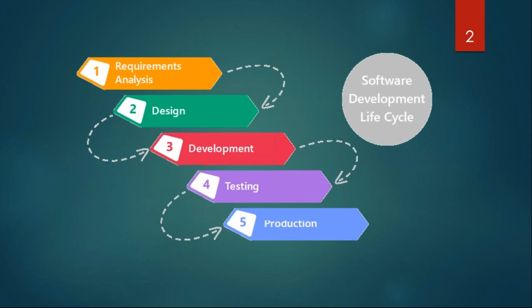If I automate a single process, we can reduce the effort of 3 employees, and they will calculate how much we are paying for those 3 employees. They will also calculate the investment cost: how much time the RPA team is going to take to develop the complete process, how much we have to spend for RPA development cost and for license, and how many systems we have to provide for that particular process. They will prepare all of that themselves. Anyway, RPA developers are not going to get this kind of cost and return on investment documents. The documents I specified in this phase are completely for development. That's it.